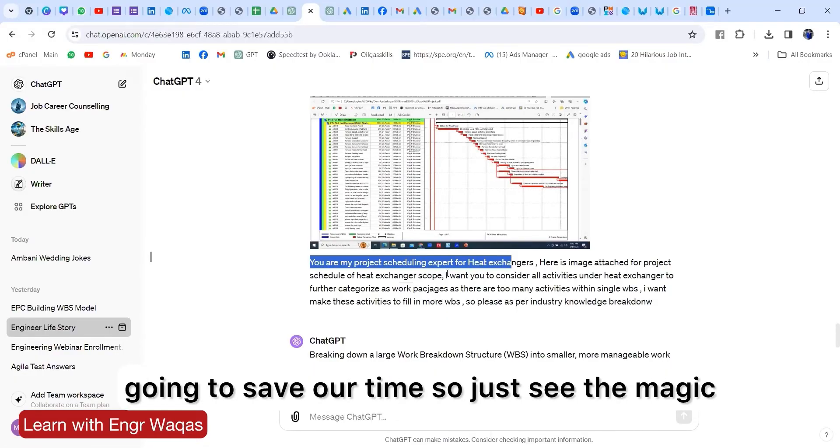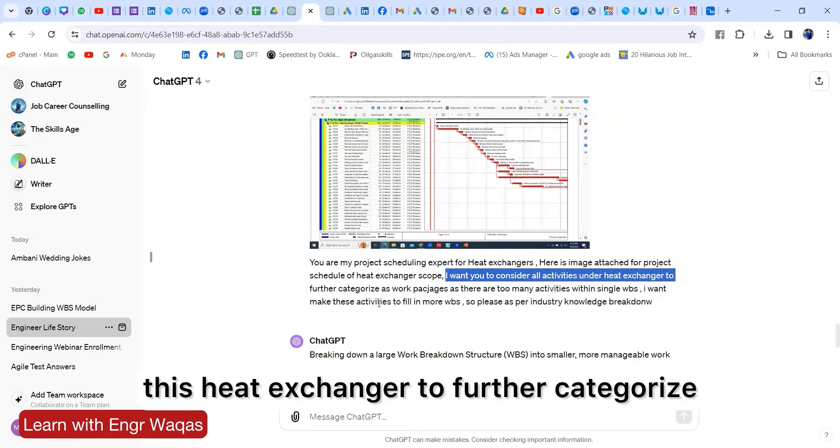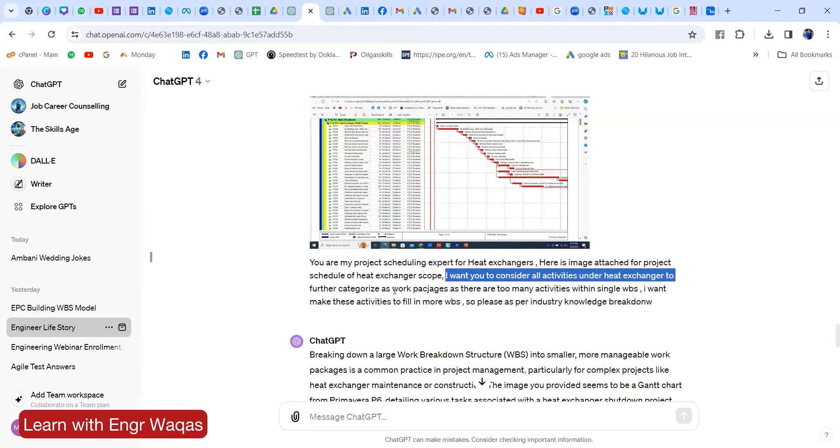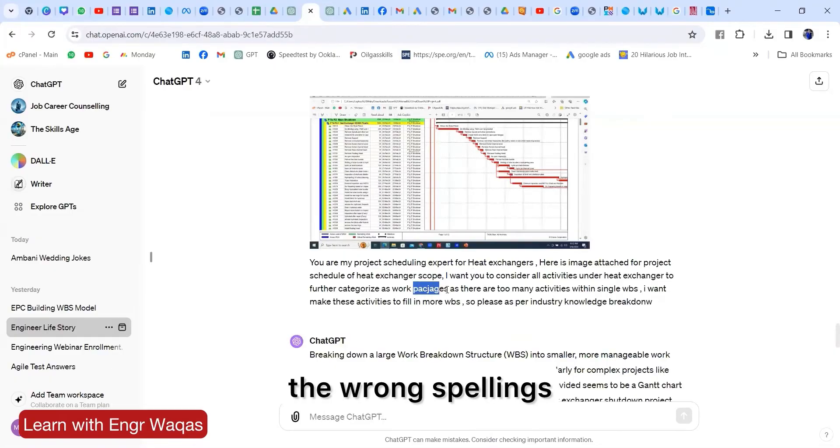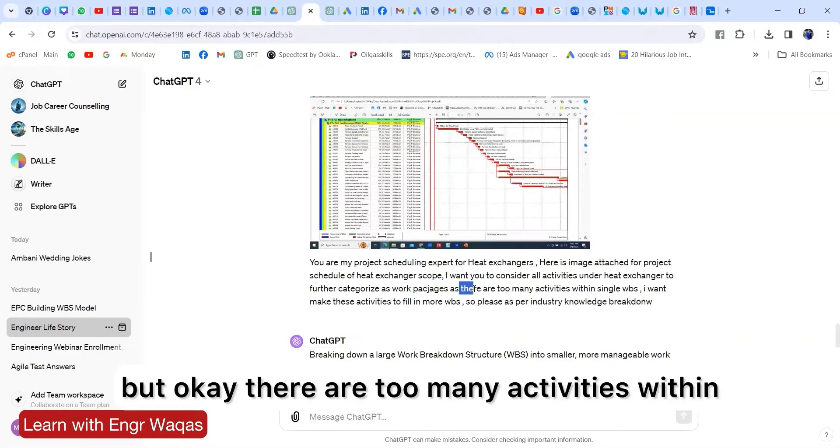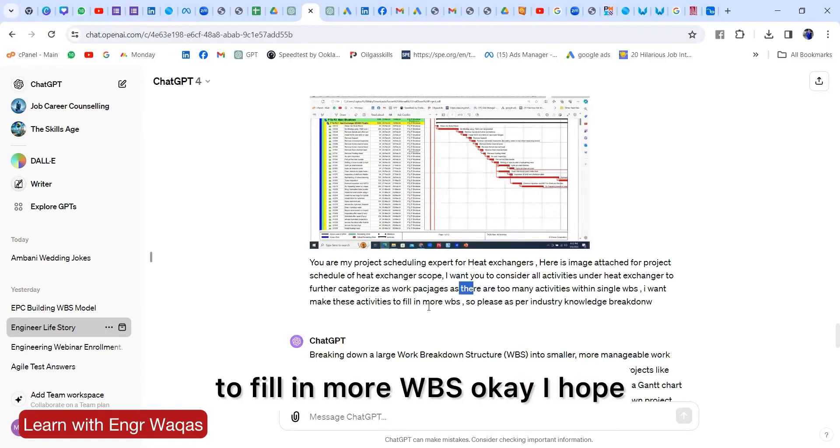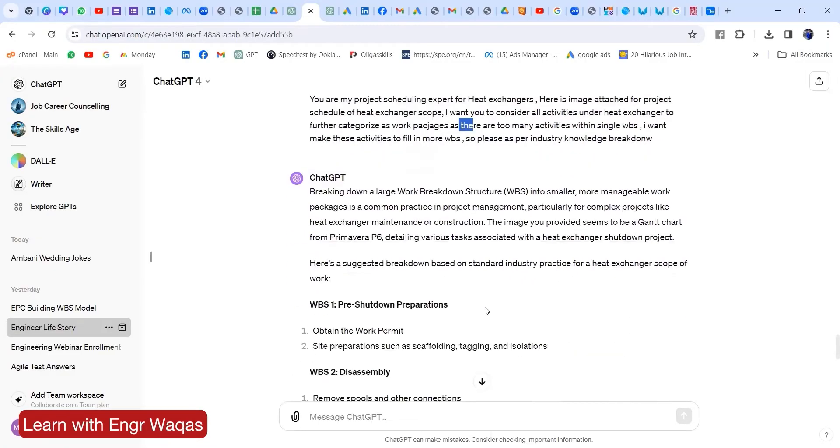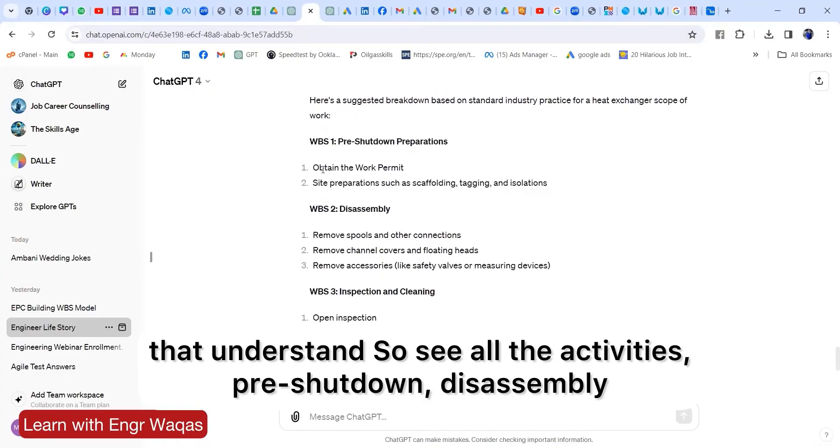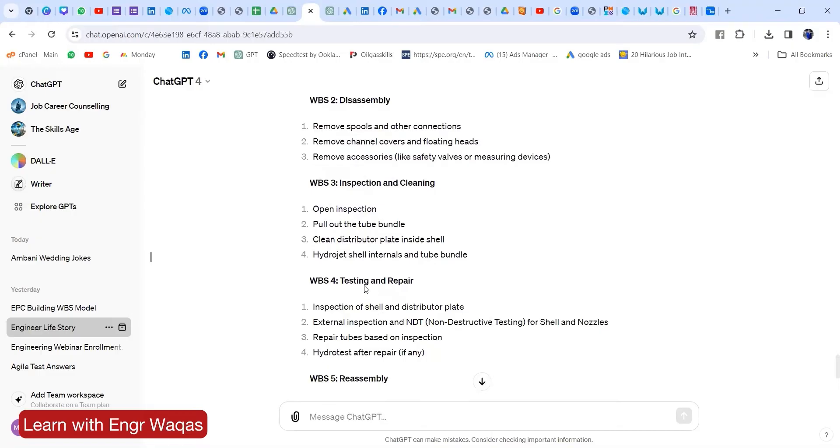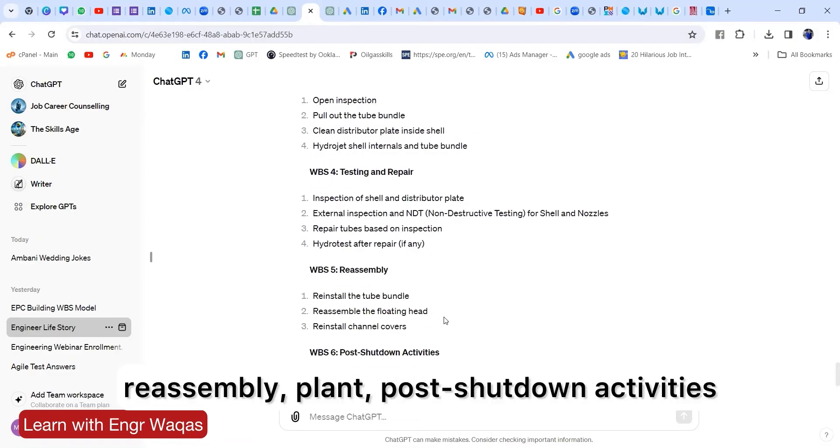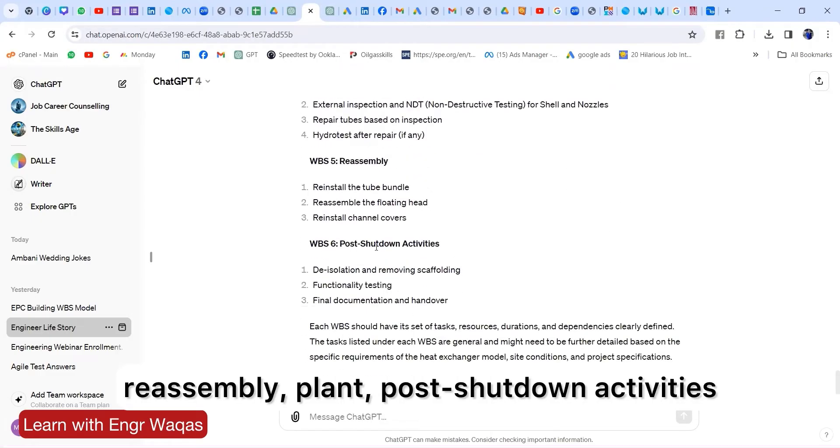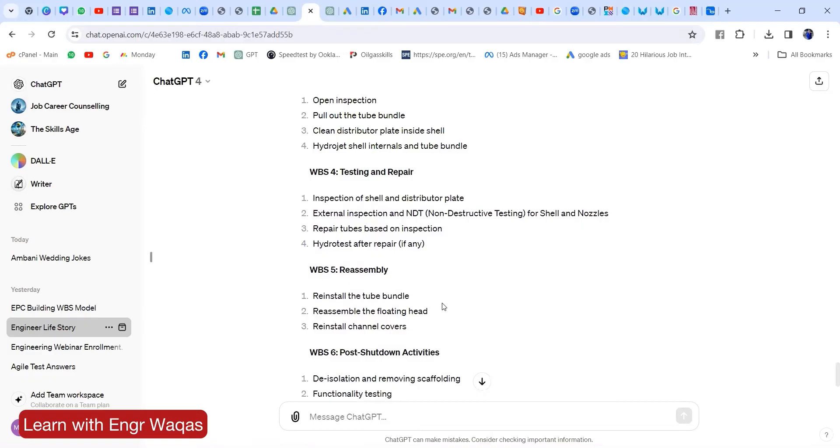Just see the magic. I want you to consider all activities under this heat exchanger to further categorize as work packages. Pardon me for the wrong spellings, but there are too many activities within single WBS. I want to make these activities fill in more WBS. So see all the activities: pre-shutdown, disassembly, inspection and cleaning, testing and repair, reassembly plan, post-shutdown activities. How logical and how smart a solution is there with ChatGPT.